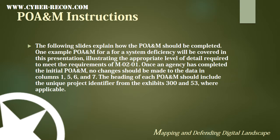The following slides explain how the POAM should be completed. One example of a POAM finding for a system deficiency will be covered in the presentation, illustrating the appropriate level of detail required to meet the requirements of M-02-01. Once the agency has completed the initial POAM, no changes should be made in columns 1, 5, 6, and 7. You'll also note that column 4 should not be changed after filling that out as well. The heading of each POAM should include the unique project identifier from Exhibits 353 where applicable.